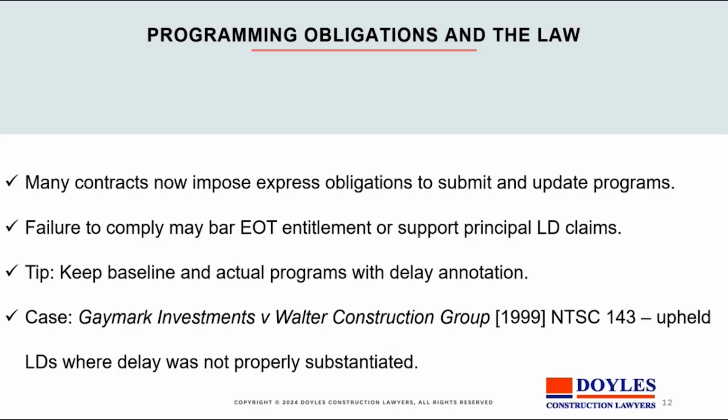So it's important that you preserve a clear view of your programming obligations and the extension of time claims you've made in order to keep things pristinely clear. Again, you'd have a baseline, or the program that you started off with, and the actual program that's now being carried out. There might have been some agreed extensions of time to that program, with or without money, and then there'll be perhaps some disputed EOT claims. But you've got to present those very carefully.